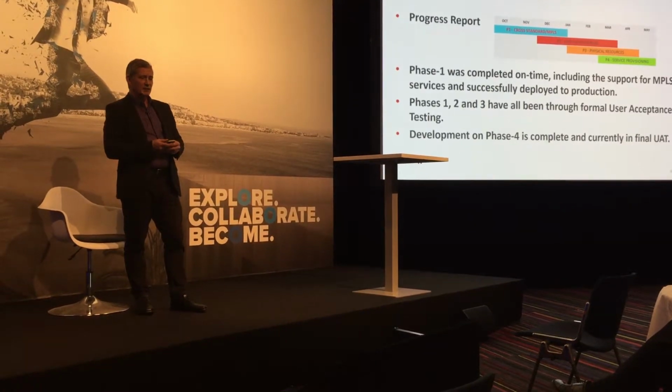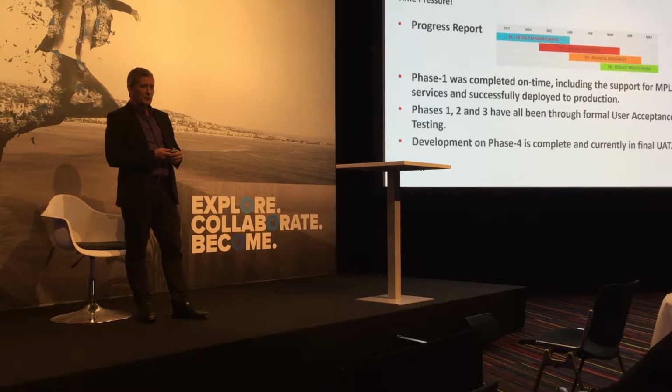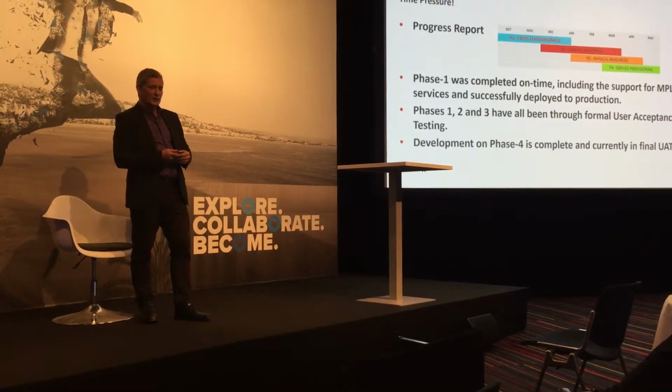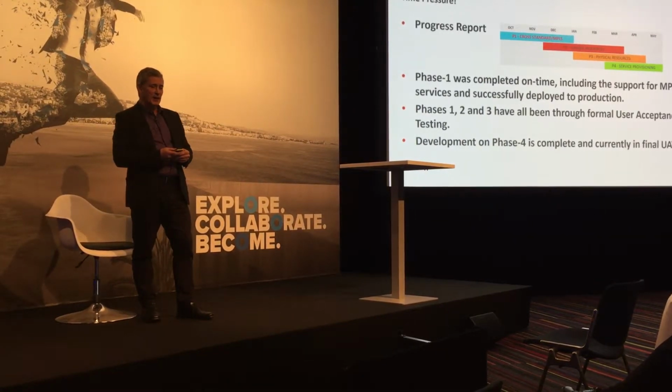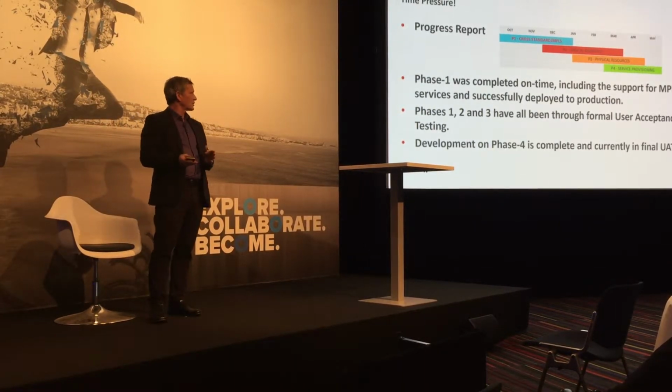The project has been running for 7 months now, and this is a progress report. Phase 1 was completed on time, including support for the MPLS services, and was successfully deployed into production. So from start to production in 4 months.